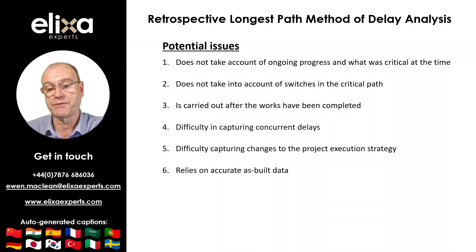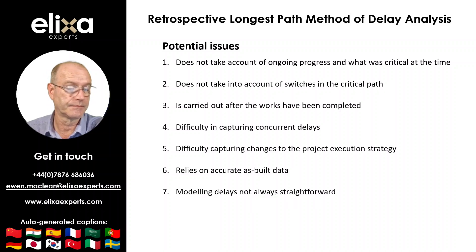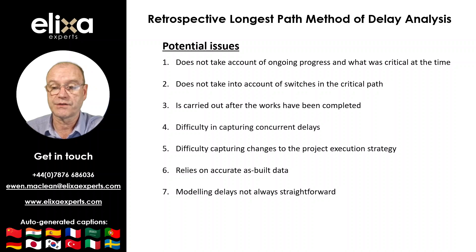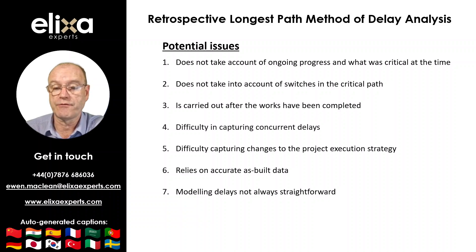Even where an appropriate as-built program can be assembled, it is also necessary for logic to be inserted into the as-built program, which is not always a straightforward exercise to model how the works were carried out. It can also be difficult to model delays. Delays can be straightforward to model where they relate to discrete periods with a clear start and finish date, such as for late design information. However, they may also be more difficult to model where they relate to achieving a lower productivity more generally for an activity which has also been affected by other delays.